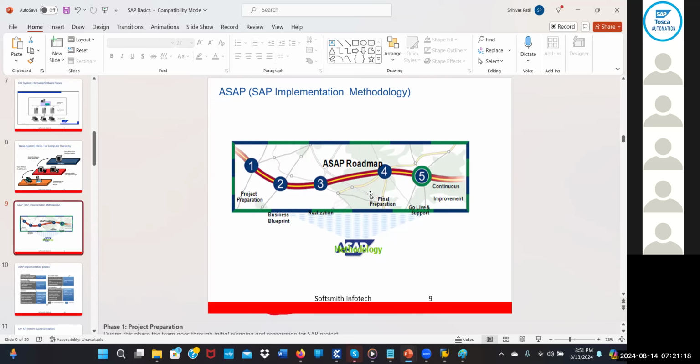They ask the dev team and dev managers whether they have any concerns. If this code goes to production and something suddenly happens, what is your backup plan? What is your rollback plan? A backup plan means they want to comment out or remove that code from the existing environment. These are the rollback plans they ask about. And if something happens, what are your mitigation plans? Those are all part of the final preparation before going to prod.